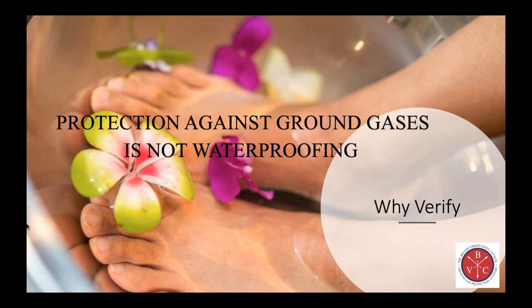Protection against ground gases is not waterproofing. With waterproofing, you only get your feet wet and often you can repair it with resin injection or renders. When you've got gas coming in and haven't had it verified or haven't put a membrane in at all, retrospective remediation is very, very hard. I would say 30% of our business is fundamentally people who have not put a membrane in, not had it validated, and therefore incorrect documentation has not been issued to the local authority — or they've not done the correct design, such as not taking the membrane across the cavity, which is a key route for gas.